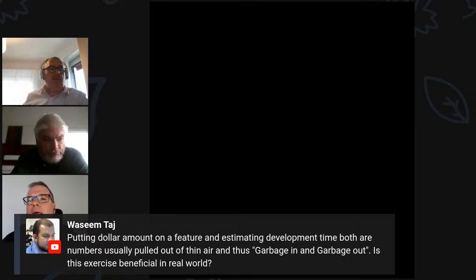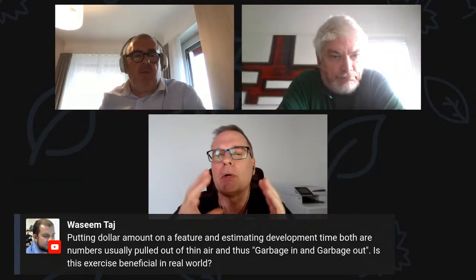It's consequential. Putting dollar amounts on a feature and estimating is garbage in, garbage out. Yes, all estimates are, don't let me say bad words here. They are not good. So estimation should be avoided in all possible ways. In fact, for the engineering part of what we do in TameFlow is exactly what Dan Vacanti is teaching, using flow metrics and basing the answer to when will it be done on forecasts rather than expert opinion estimation. But the point is, the business side is not accountable.